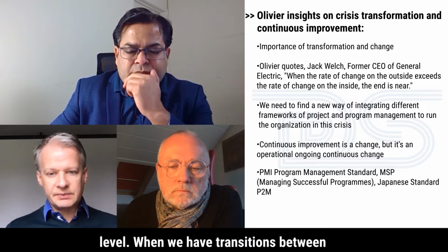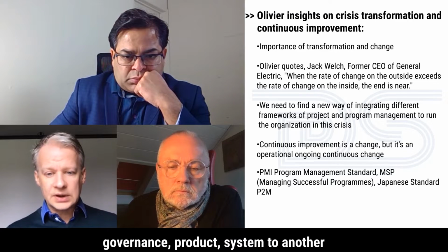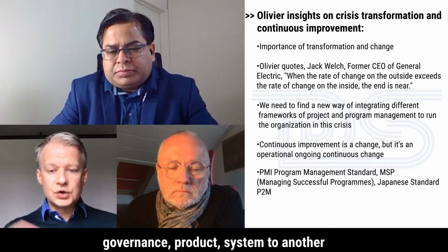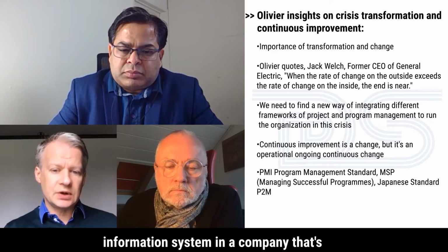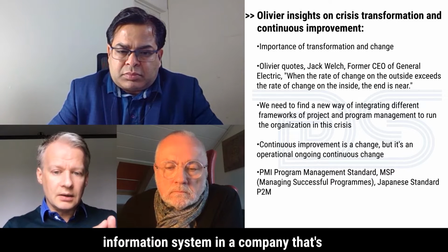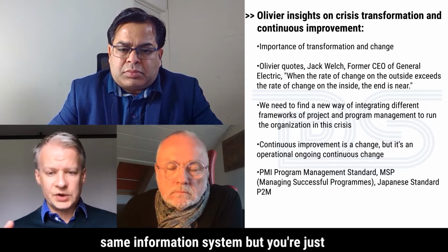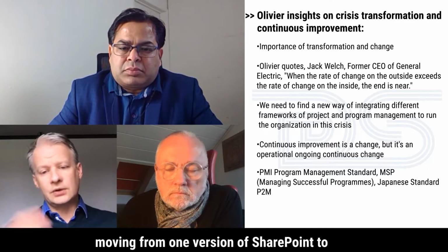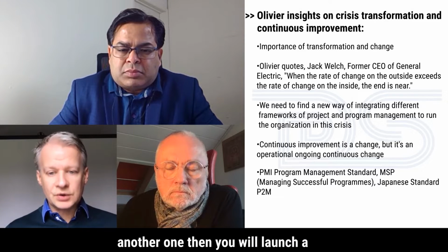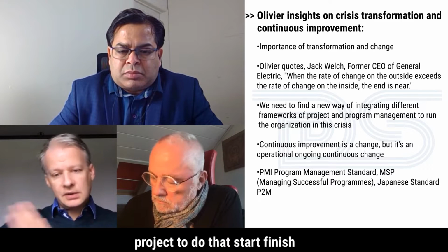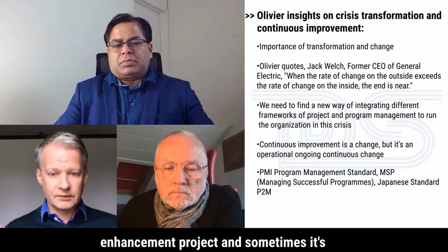Where we start to enter into project and program management is actually the next level. When we have transitions between one state of something, process, governance, product, system, to another state. I mean, deploying a new version of an information system in a company. That's limited in terms of outcome to your information system. It's basically the same information system, but you're just moving from one version of SharePoint to another one. Then you will launch a project to do that. Start, finish, deliverable. That's what I call the enhancement project.